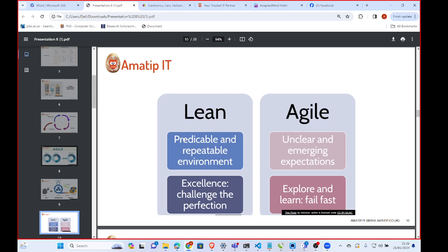Those are the major things that usually differentiate or determine which of these two approaches someone will employ for a particular project. So if you are using agile, if something will fail, it will fail fast. If you are doing it bit by bit, by the time you pick the first bit and deliver it to the customer, if they are not okay with it, they will easily tell you as soon as possible, compared to if you want to finish the whole project before you deliver it.